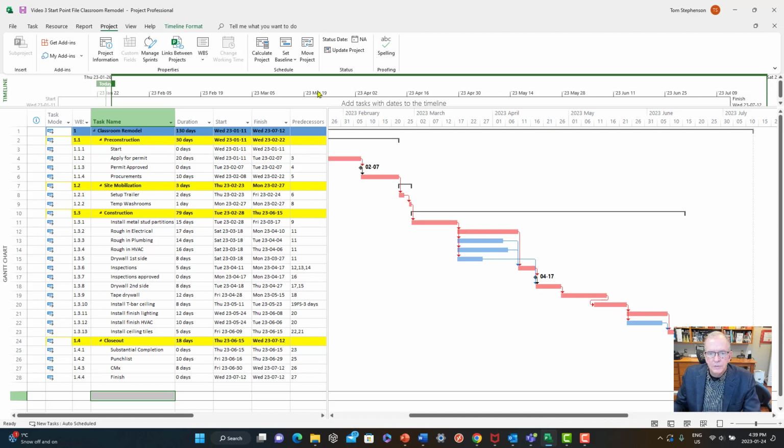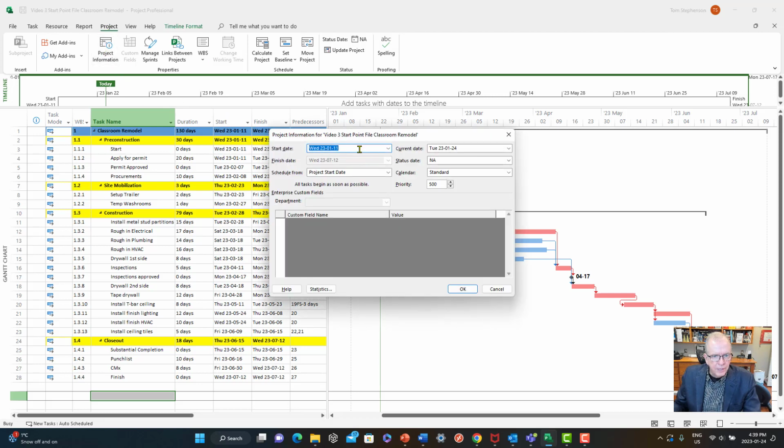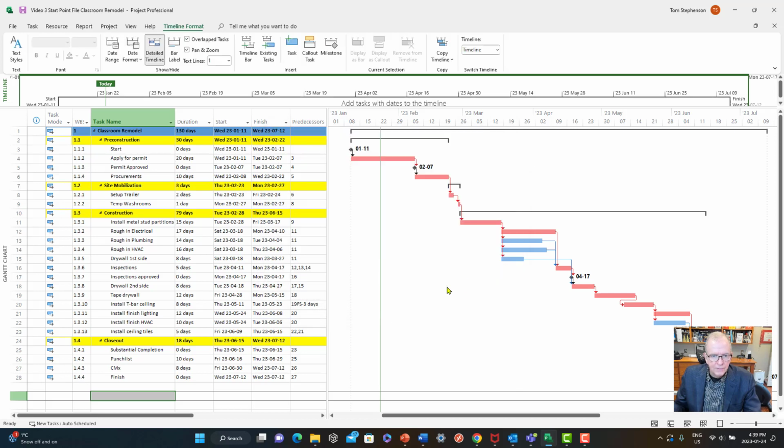Just pull this in the timeline so you can see a little bit more on the project here. All right, so this is not affecting my project because if I go to Project tab, Project Information, this box tells me when my project started. We did this in the first video, right? But it also tells me what calendar my project is following. I could make it follow the plumbing subcontractor, but I don't want to. It's following the standard, and that's the default. I'm going to click OK, that's fine.